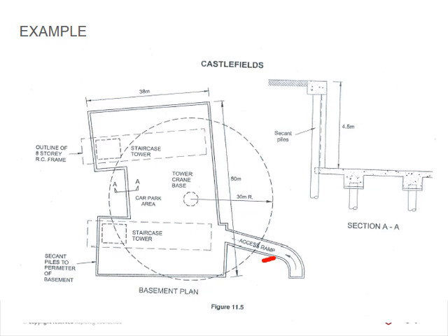I'm not going to go through the method statement in detail, but you will see you've got your description of the works at the top. That's the one that you've just started. Then you've got your sequence, where prior to excavation works taking place, the following procedures must be carried out, and then you list the details of how to go about it. Then you've got a second section, your resources: your supervision, your labor, your plant. You list all those items that you need to sequence here.